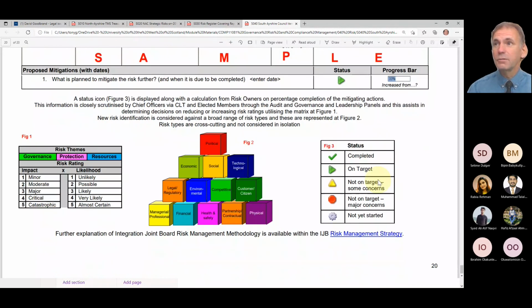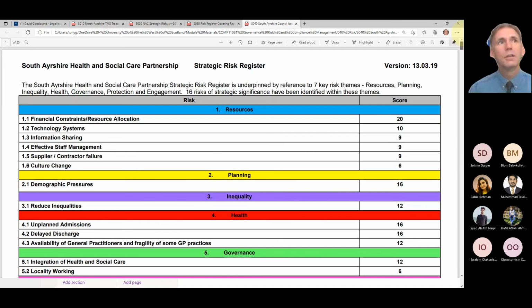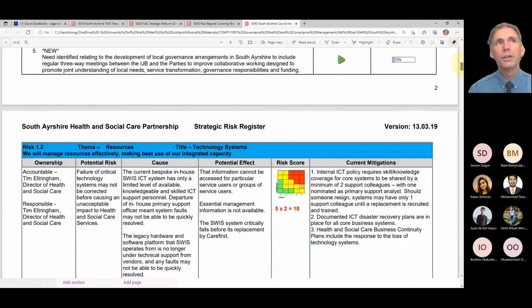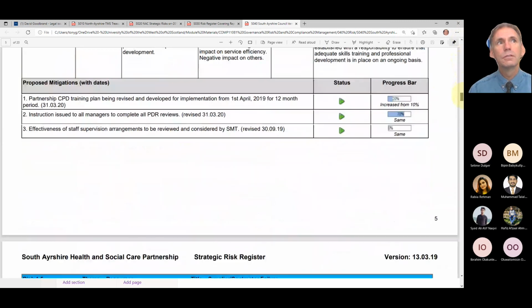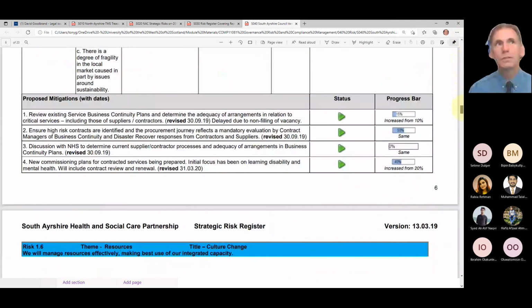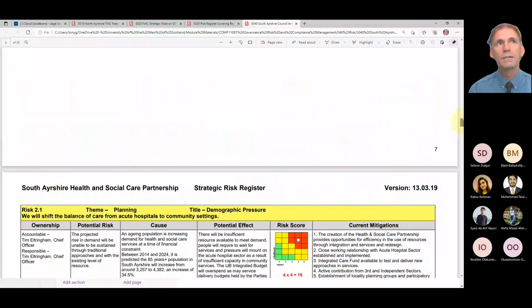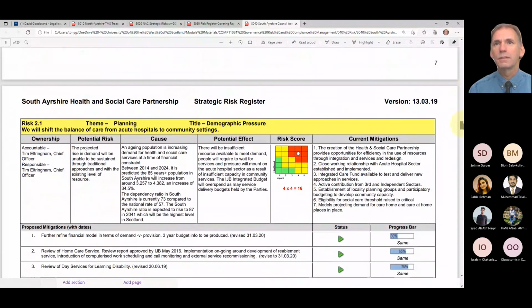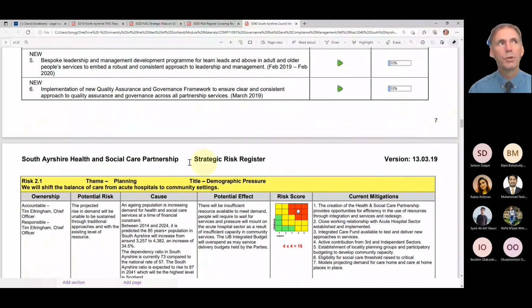I do actually have an issue with this one, and the issue I have is this thing here. They've assigned colours for each of their areas. Political, economic, social, and all that kind of stuff, which is a good idea. But if I'm scrolling down a risk register and, having been used to seeing things in red, meaning there's a problem, or seeing things in amber, meaning I should worry about them, I see this and I think, oh, what's the problem here?